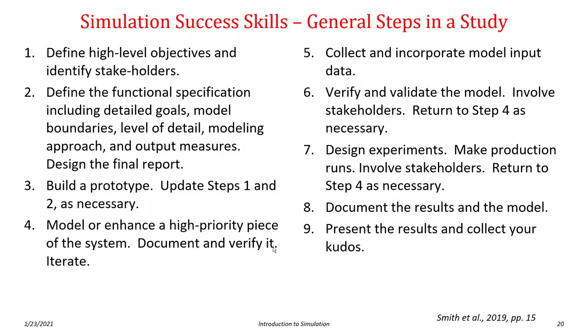And so the general steps in a simulation study are as follows. You first define the high-level objectives and identify the key stakeholders. Define the functional specification, and this is the document that we just talked about: detailed goals, model boundaries, level of detail, and so on. Build a prototype model. Update steps 1 and 2 as necessary. So based on what you're seeing in the prototype, you might have to update the objectives or the functional specification in some measure.